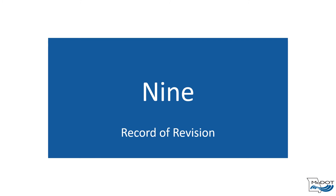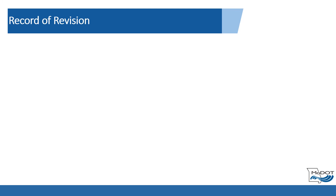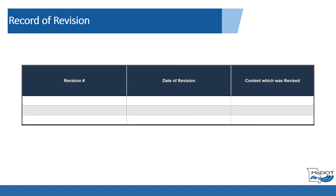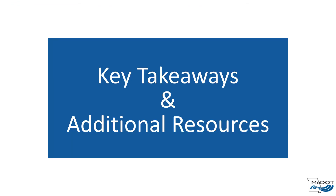The last section of the Methods and Assumptions Report Template, Section 9, is Record of Revision. As mentioned at the beginning of this module, the intent is for the Methods and Assumptions report to be updated as methodologies and assumptions change during the project. Therefore, this section should document the revision number, date of revision, and the content that has been revised.